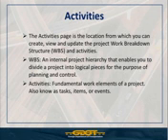So the WBS, the typical work breakdown structure, is being developed by your program control group in their master template. Essentially, any work breakdown structure would be like dividing the project into logical chunks of work. Within the work breakdown structure, then, is where you have your individual activities, right? That's also called tasks, events, items, etc.